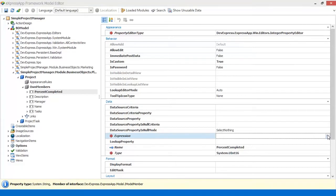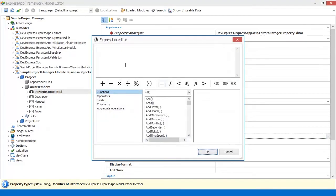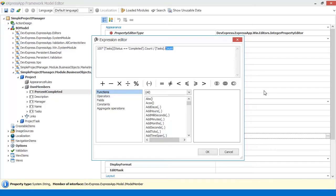Now it's time to specify an expression we can use to calculate the percent completed. I multiply 100 by the number of completed tasks and then divide by the total number of tasks. We should also take into account that we may have no associated tasks, so I add an if statement to avoid division by zero.